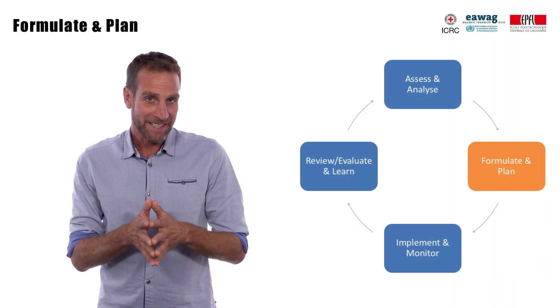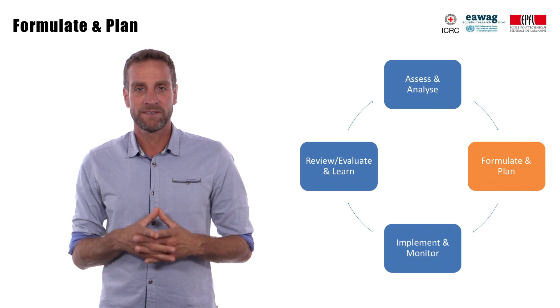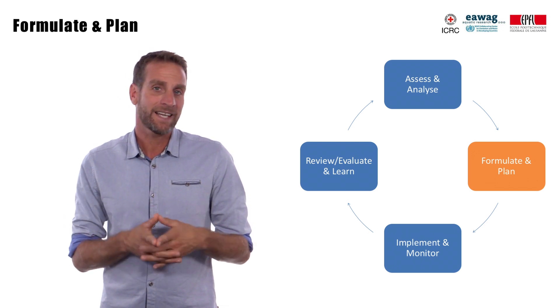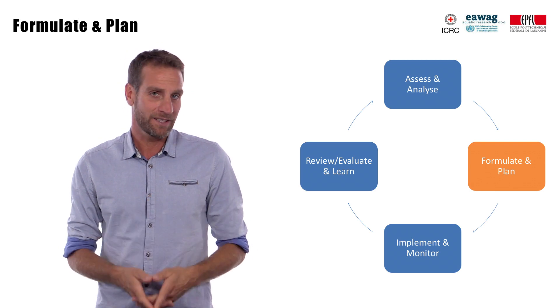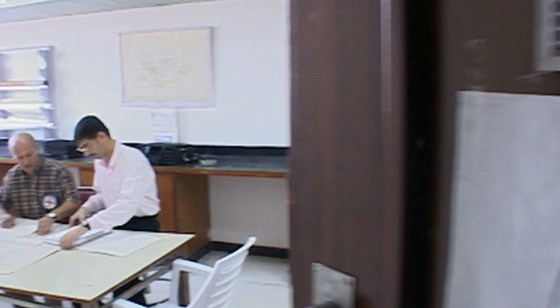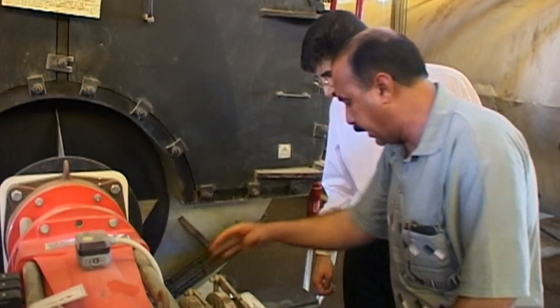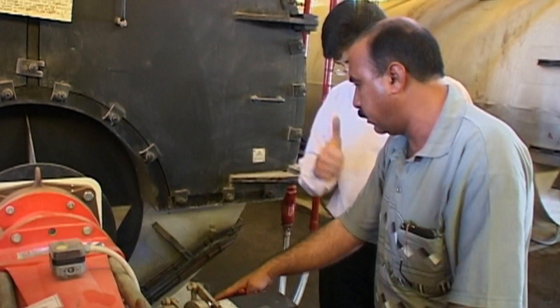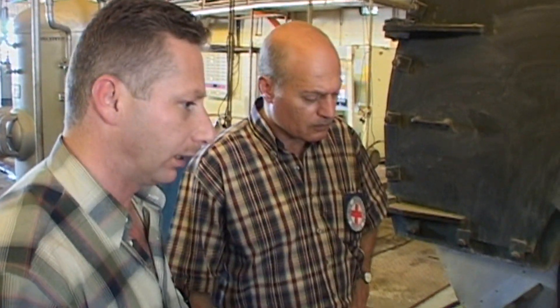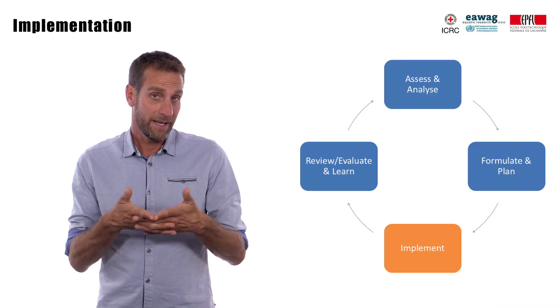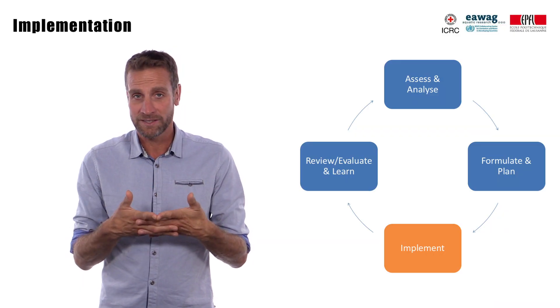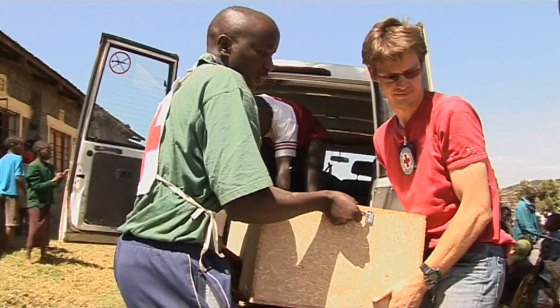In the second step, you have to formulate clear objectives based on context analysis and your assessment, and describe measurable intended results. You should assess the feasibility of your project — particular attention should be paid to future operation and maintenance. You have to plan activities and resources required to accomplish the objective. Then, based on your plan of actions, you can implement your project.